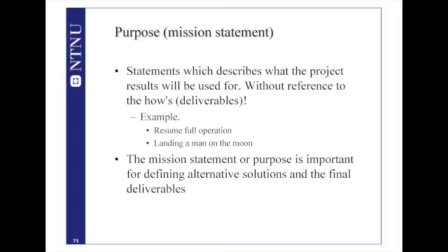And this mission statement becomes important when you are trying to evaluate different solutions. A project is not only a mission statement, you have to make something. So when you decide what to make, what to do, the mission statement becomes a control variable here. Which solution will give you the best mission statement?